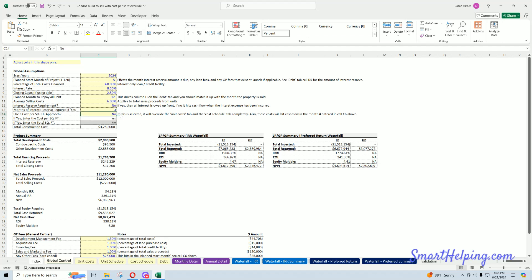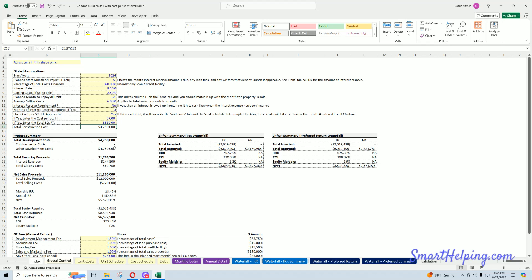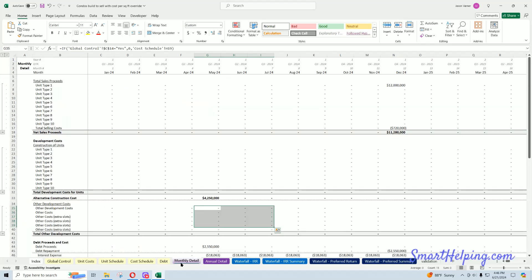So if you do, you could hit yes here and your square feet here, I'm saying 5,000 square feet and $850 a square foot gets me to 4.2 million total construction costs. And then all that construction costs will hit in the start month of the project, as you can see here.